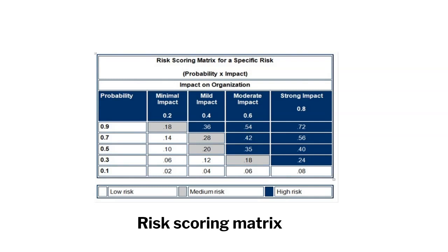Assumptions that have been made, such as availability of funding by a certain date or availability of a key resource, present a significant source of risk in projects. Therefore, an important aspect of qualitative risk analysis is the testing of project assumptions. Assumptions must be tested in 2 dimensions: testing the stability of the assumptions, the probability that the assumption will continue to be true over an extended period of time, and determining the consequences if the assumption later proves to be true or false. For each assumption being tested, alternative assumptions that may be true should be identified.